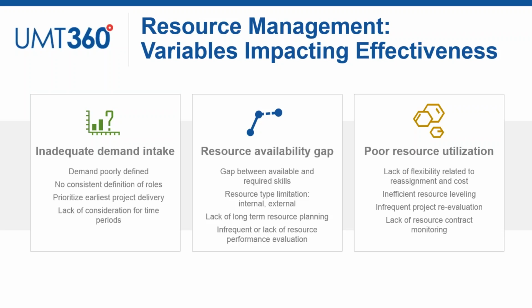Typically, we recommend that organizations form the demand in terms of generic roles such as developers, testers, analysts, project managers. However, you can also use real names of people in your pool, whether employees or contractors, but at least we need to have a common denominator between, okay, are we doing this by role or by skill or by any other parameter? So understanding what our standard list of roles is, that's really important.